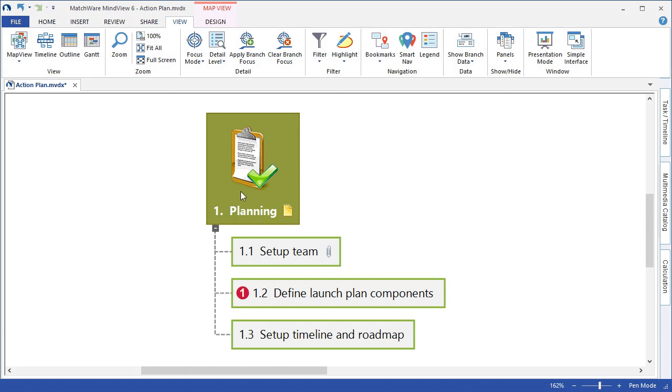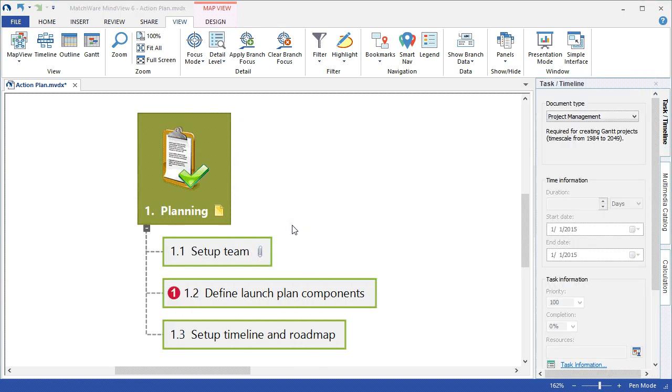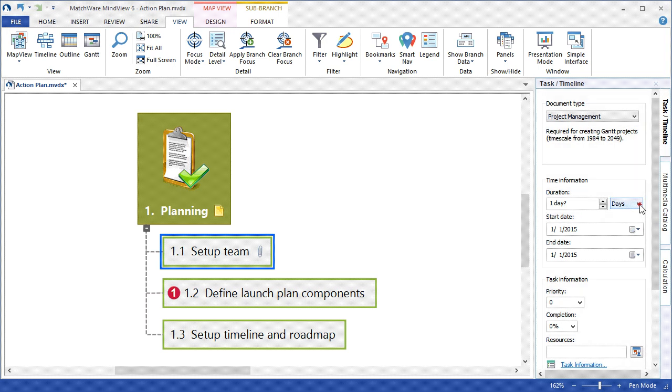To continue with scheduling an individual branch or sub-branch, I left-click that branch, choose the Task Timeline Panel from the right side of my screen. Now that we've launched the Task Timeline Panel, we can left-click our desired branch and start adding the task information. We can select the duration for a specific topic and choose the desired metric to measure that duration.